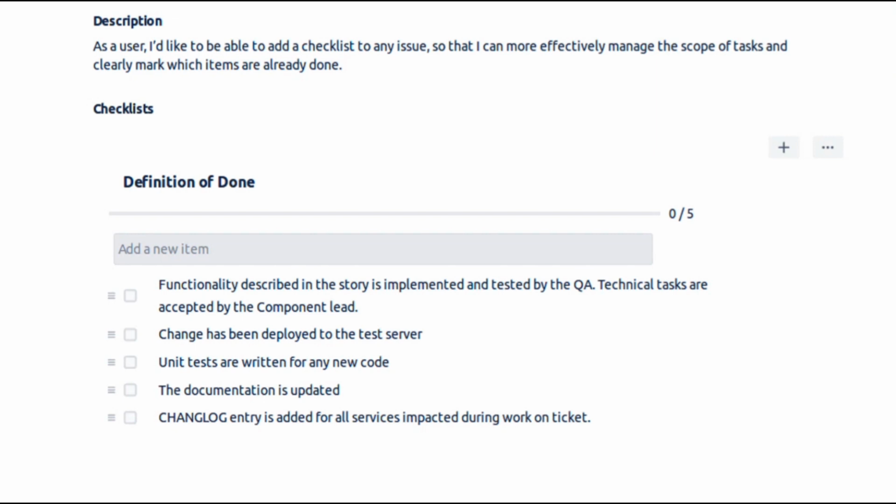So next time, when Raymond's boss asks, Raymond, are you done? No, I've not done because we have 2 more checklist items not finished. Oh okay, that's clear because we know what the status is: either you're done or you're not done. If you're not done, you should be able to say what's left. And if you're done, it means you have cleared the checklist.